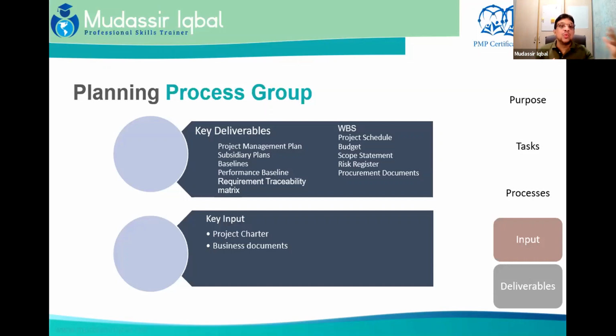That is where the requirements traceability matrix and competing objectives and requirements come in, because one person is saying I need direct access from the kitchen to the ballroom. The security in charge says no, sorry, I cannot allow direct access; you have to go through this door. So these become competing objectives on the project. The security manager is saying you should have electronic gates installed on the main door, and the hotel in charge is saying no, it will make a queue at the gate.